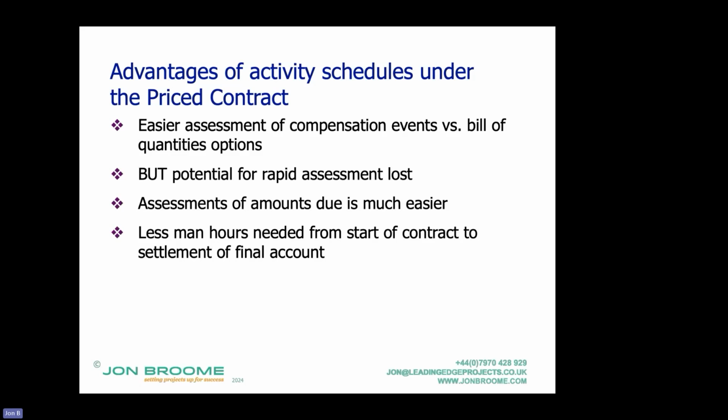You're effectively asking, is that activity complete, yes or no, at the end of each month? I remember one project manager saying it's a half-hour walk around site at the end of each month. Compared with when I was on site for a contractor, we would be diverted for a week from doing engineering to doing a measure.